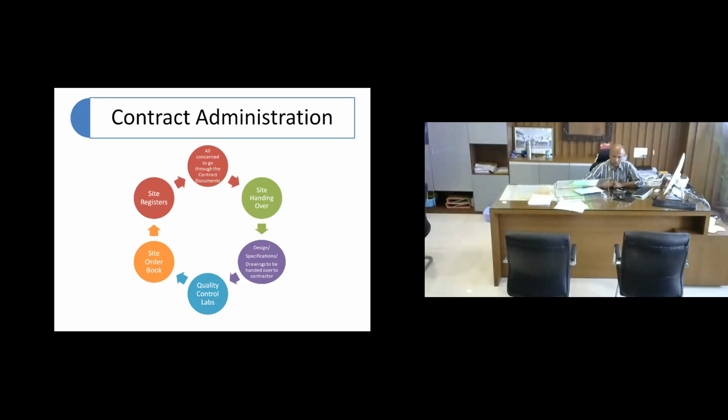So I had two options. I could argue with them, or I could fight them. I did not do anything. I simply asked for a site order book and entered my observations and said that work is stopped till such time water supply arrangements are made for site work and compaction is done properly and the required degree of compaction is achieved.